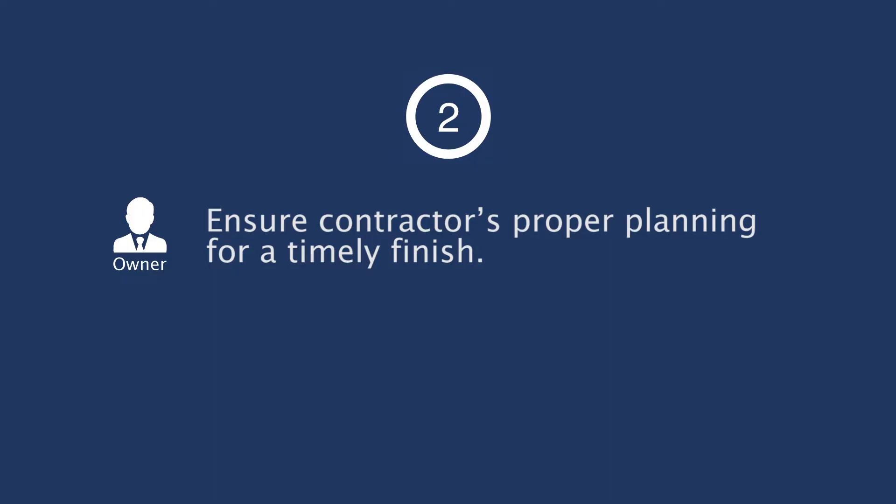Reason number two: owners like to ensure contractors' proper planning for timely finish. And in this case, it's not only a schedule that says the project is going to finish in 12 or 15 months, it's going to be detailed with milestones for the owner to measure the performance of the contractor.